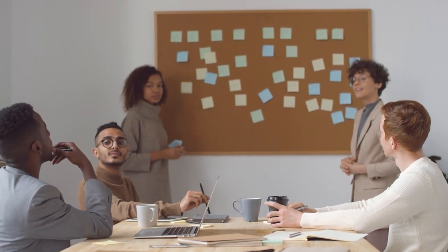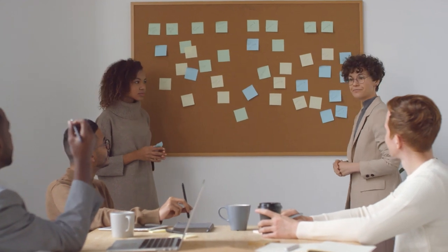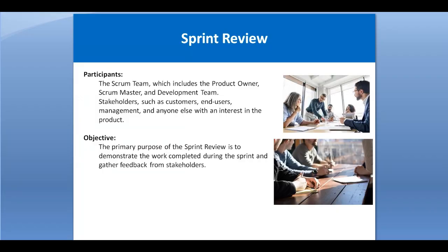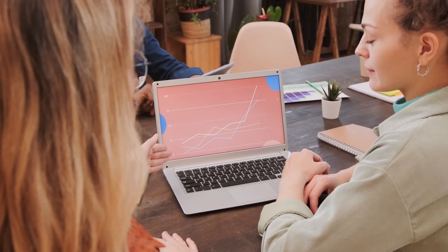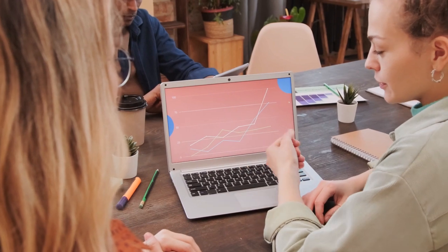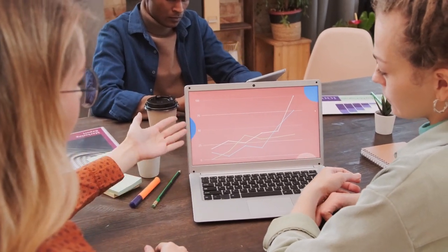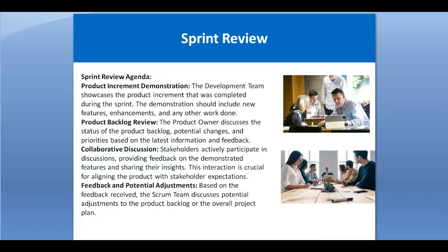Friend, we know that this is very important: we get the feedback from the customer at a very early stage of a project. Generally, in the waterfall approach, we get the feedback from the customer once the project is finishing. However, in the sprint review in the Scrum framework, we get the feedback from the customer at a very early stage during this sprint review session.